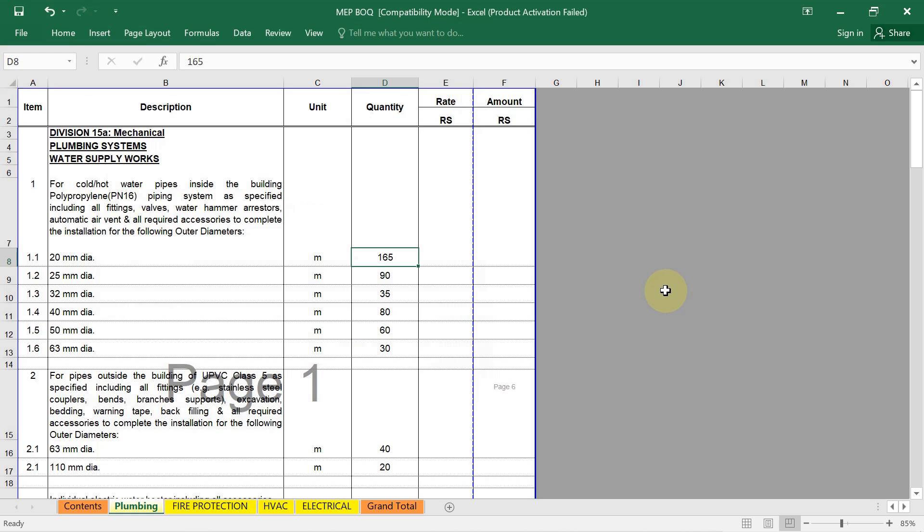The second step is to break down the plumbing work by category. Divide the work into major categories such as pipes, fittings, fixtures, valves, insulation and testing. Then the next step is to list all components and activities like pipes, fittings, fixtures, valves, insulation, testing and commissioning.